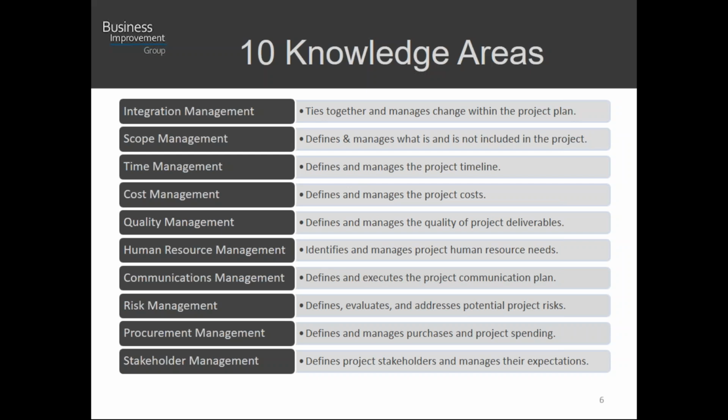So in project management, we base everything off of estimates. Now, there's also what we call successive elaboration, where in the beginning my estimates could be grossly off, but they're good enough to get started. As the project progresses, we gain more information, we know how things are going, and we can make adjustments along the way. So long as you weren't terribly off, you're usually able to reel it back in and recover and have a successful project. So again, there are going to be tools to help with that as well.